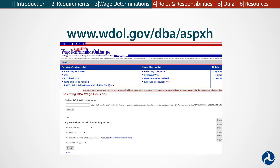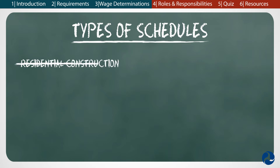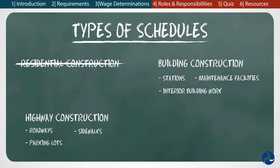That means that the laborers and mechanics are paid different rates based on the type of construction they are doing. There are four different schedules or construction types under the Davis-Bacon Act. First, there is residential construction, which isn't funded by FRA grants or loans. Next, there is building construction, which includes stations, maintenance facilities, and interior building work. Then there is highway construction, which consists of elements like roadways, sidewalks, parking lots, and paths, which are common with some rail projects.